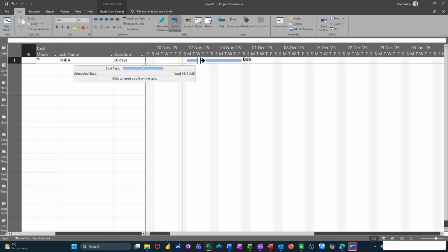Now, if you click and hold, as you move forward, that becomes 2 dates, and it basically tells you where you're going to let it go. So that's saying Monday the 24th and to Wednesday the 3rd. I'll let that go, and you can see that break there. Now, if I do that again, this time I'll pick Thursday, push it forward into Tuesday, and then you've split that task into 3 separate bits.